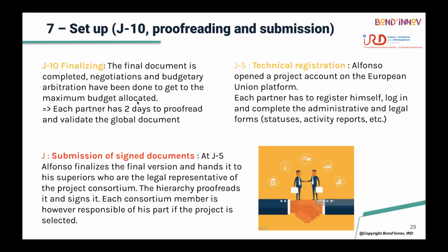If the platform is open, start by opening an account and see what the different sections you need to fill are, the documents you need to upload, and the format of those documents. This is really very, very important, because sometimes you can have a template provided, for example a Word document template provided at the launch of the call, but after the call opens, the platform could change some elements.